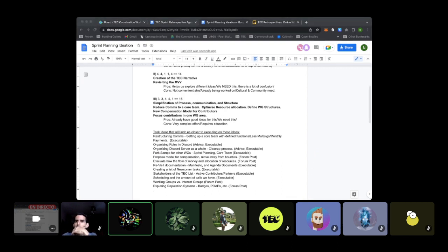Okay. Yeah. So we have a large group of ideas here, and each of us are here. Let's see, 1, 2, 3, 4, 5. Okay, so there's 5 of us. So I really want us to choose maybe just one that you would like to execute on, or one that you want to do for the sprint, at least one. But yeah, if you feel like you have time to execute on 2 of them, I don't want anybody to select things that they're not going to have time for, because at the end of the next 2 weeks, the sprint retrospective, I really want to go over and see what else needs to be worked on.